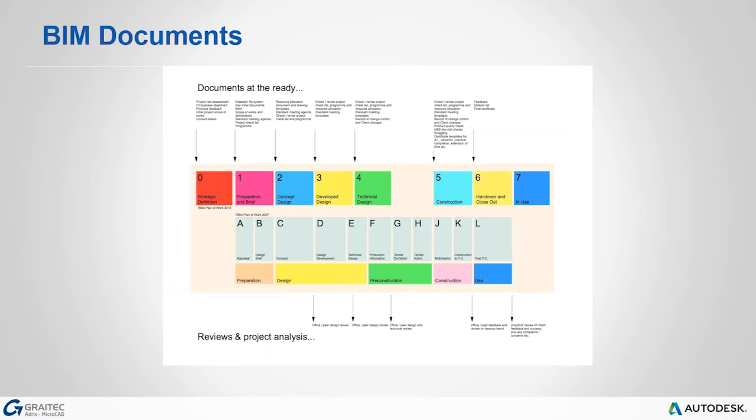We can see that there are a slightly increased number of stages regarding the spread of time. Okay, and the reason for this is all about getting a greater level of detail in the design and in the collaboration. Stages 3 to 4 are expanded, and this is to include the opportunity of collaboration between the different construction industries, where even before construction starts, clashes between services, structural elements, analysis for lighting and heating can be performed. So in this area, we start making sure before we even get to construction, every aspect of the design has been confirmed. There won't be any clashes on site, ideally.